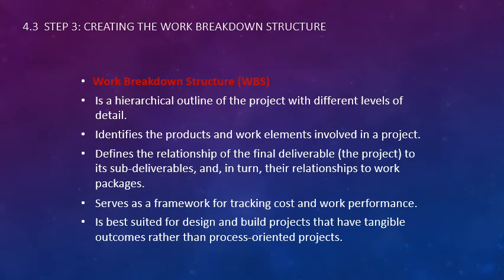Creating a work breakdown structure. So as I said, I want to make sure that you have gone through the book and understand how to build one. So you're starting at the high level and working down until you get down to the work packages, which can be assigned to the team members.